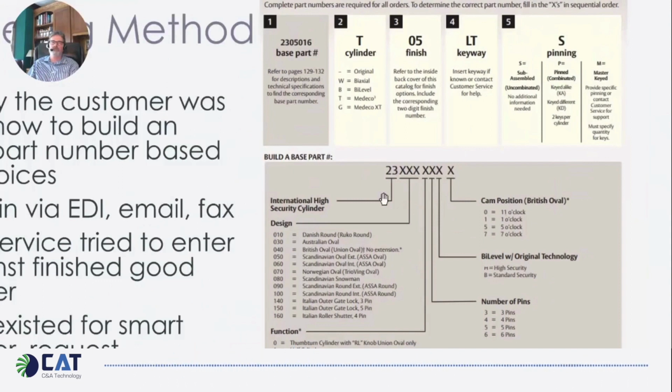However, when we first started the project, the scope, the project charter, was to not implement the JD Edwards Configurator. The original plan was to not try to disrupt the business by implementing the configurator and making this big change in how they went about placing an order for the product. We didn't want to go through the change management impact internally, and particularly with the customers, because their existing customers already knew how to do this.